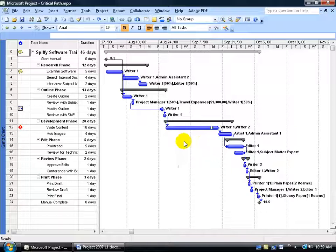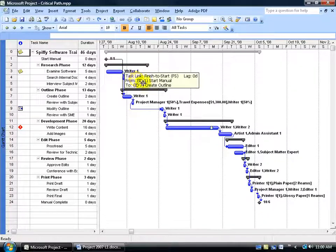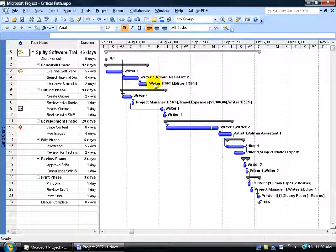Not necessarily. For example, I've got a couple of tasks where if I don't finish the first one on time and it gets delayed a couple of days, it will push the next task out because of the finish-to-start relationship. But if it gets pushed out a couple of days and has nothing else linked to it, it still finishes before the project end date, so it's not critical. Even if it's just a day, it doesn't make those linked tasks a critical path.